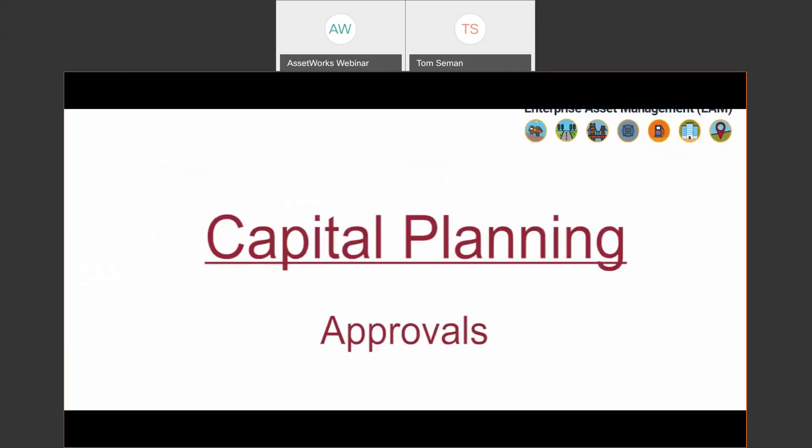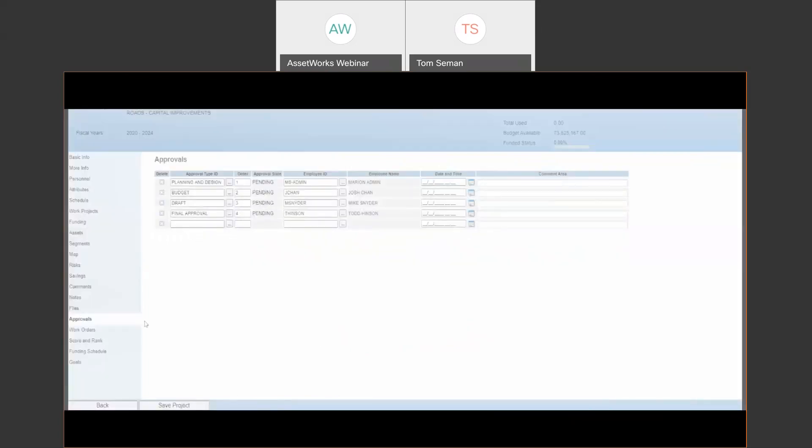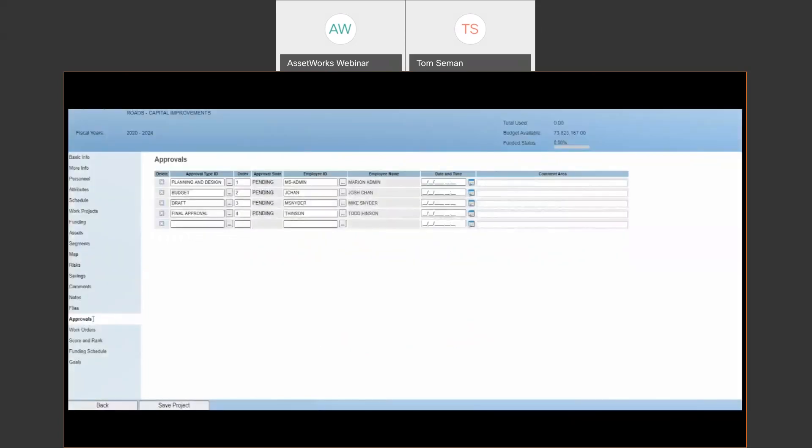There's also I mentioned approval workflows that can be built into approving projects underneath a plan. So authorized users can change statuses, make approvals and basically approve a project before it becomes active and ultimately tracks real time spending.